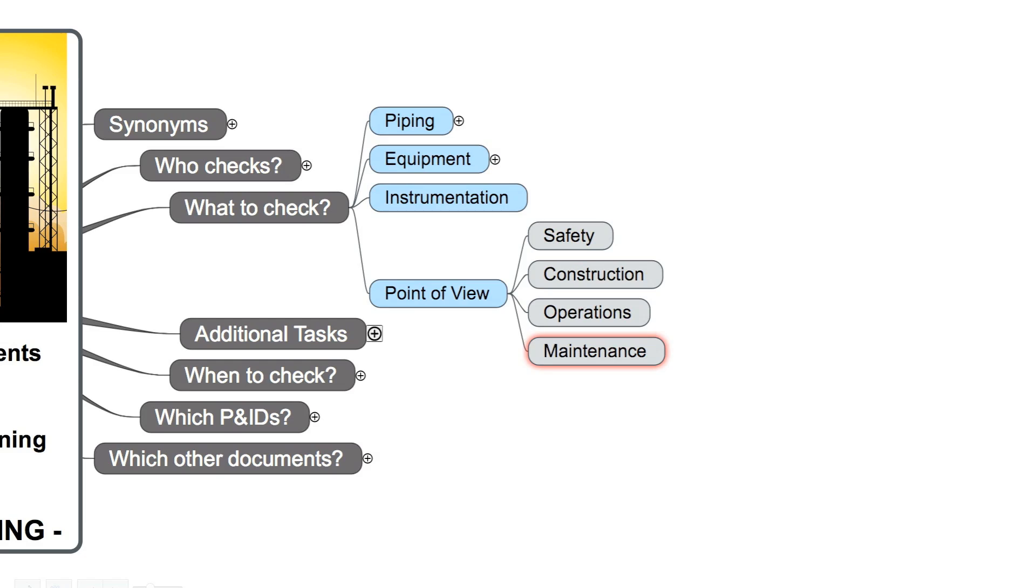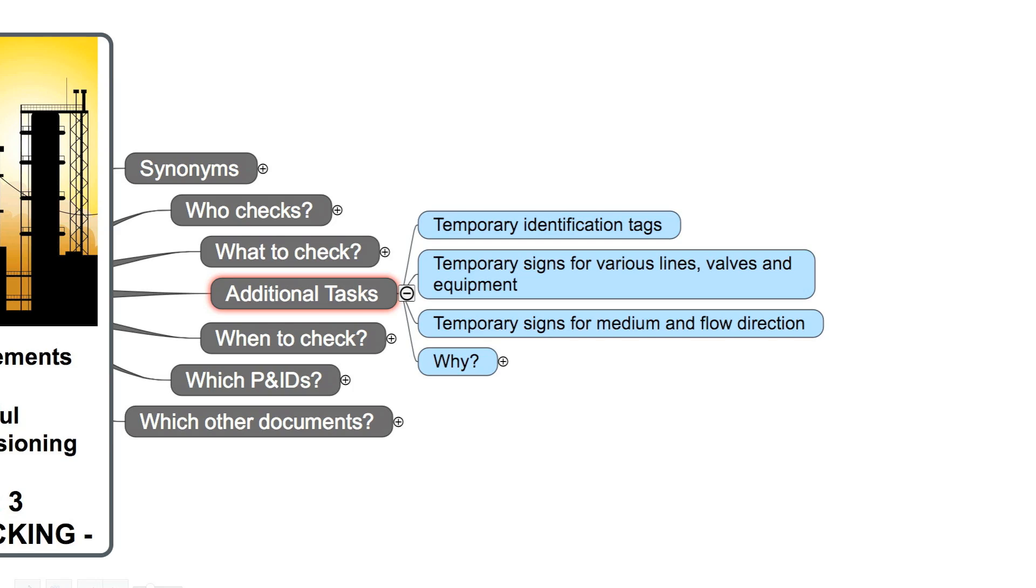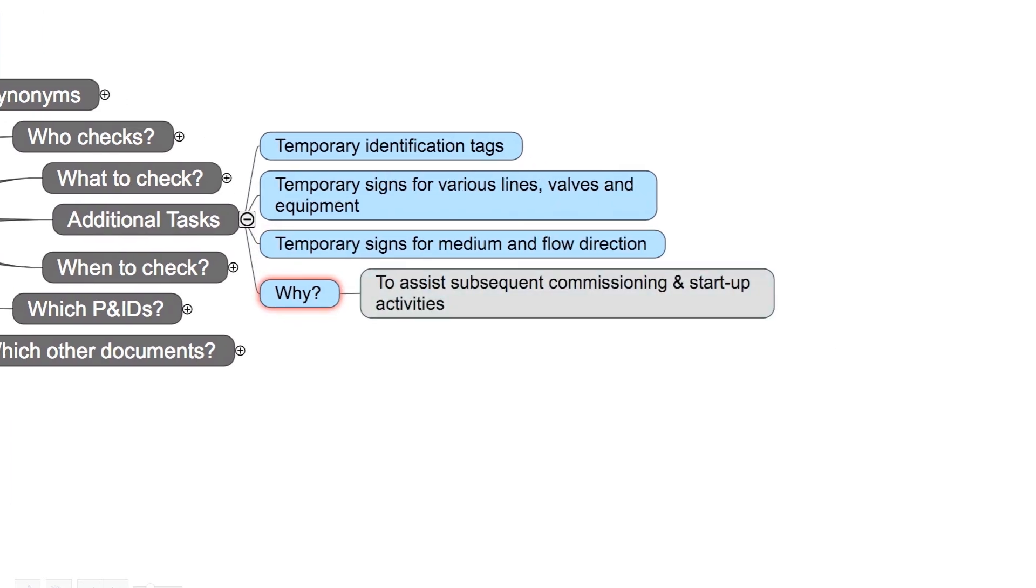It's a good idea to perform the following additional tasks: attach temporary identification tags, attach temporary signs for various lines, valves, and equipment, or put on temporary signs for medium and flow direction. Why is this a good idea? Because this makes it easier to perform the future commissioning and start-up activities.